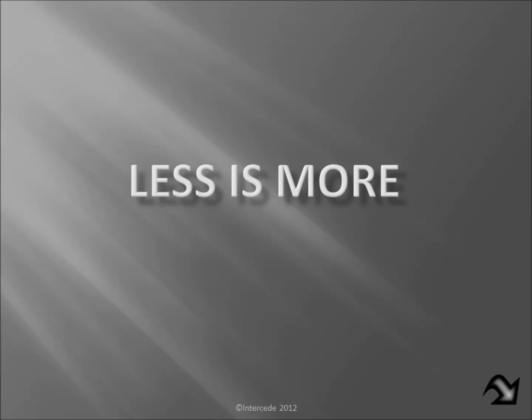Now, one of the things that you have to remember is that the schedule does have to capture all of the hours that were presented in the estimate. So any time variable cost, and that could include rentals, should appear somewhere in the schedule.